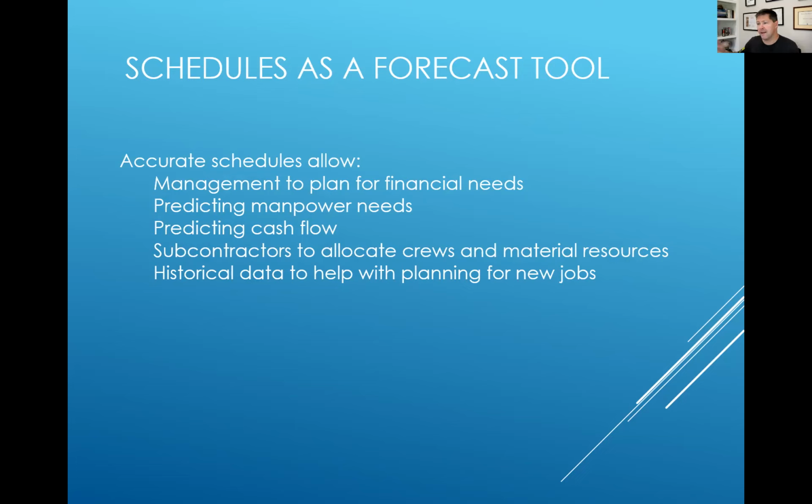Historical data. Obviously, when you've completed projects, those completed schedules act as a historical data sheet, if you will. It helps you plan, okay, a job of this size, this complex, cost us this much. We thought it was going to take us this many days. It really took us this many days. And it makes you more competitive for future jobs because you've got the historical data. You know how much money you spent, how much time you spent building other products. What the allocations were for the job.